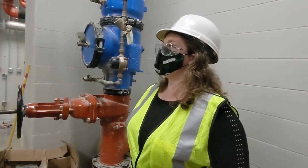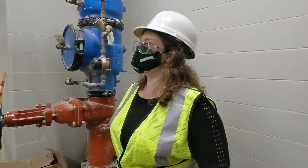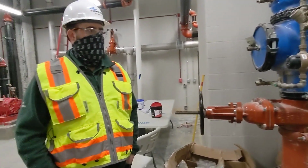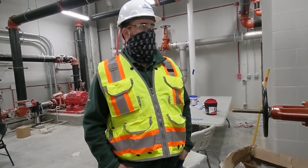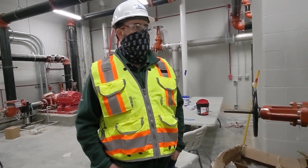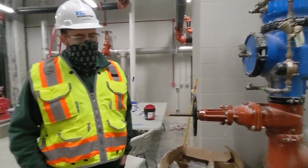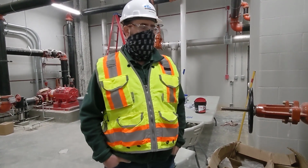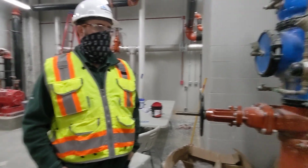All right. So when you were measuring the moisture, was that just in the pipes, or was that for the floors and all of the... It's for the flooring, the sheet goods, and whatnot. So basically taking a probe for relative humidity. All right. Don't want floors to buckle. Yeah, and monitoring air quality continuously to make sure that the relative humidity in the air was meeting spec as well. All right, all important stuff.